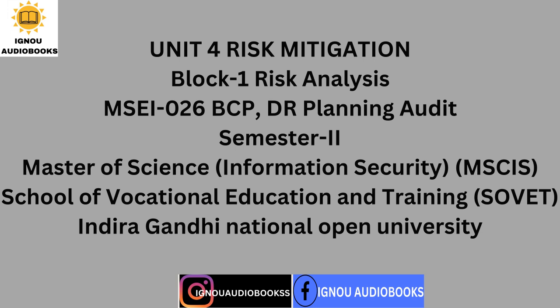Evaluate risk interactions and common causes. Identify alternative mitigation strategies, methods and tools for each major risk. Assess and prioritize mitigation alternatives. Select and commit the resources required for specific risk mitigation alternatives.